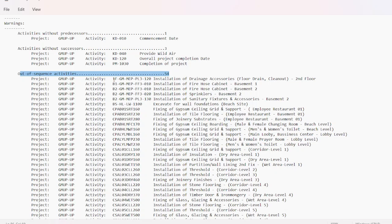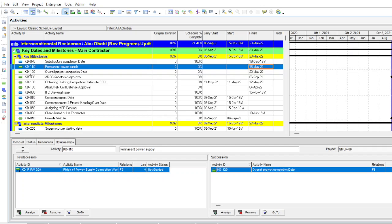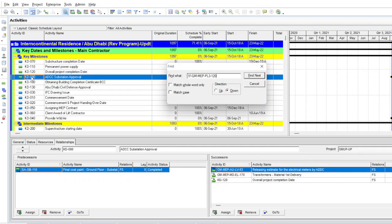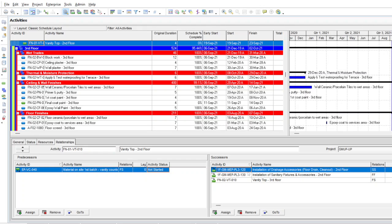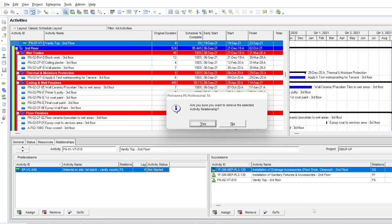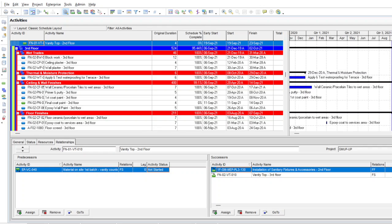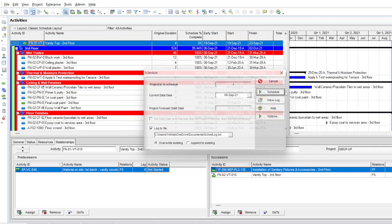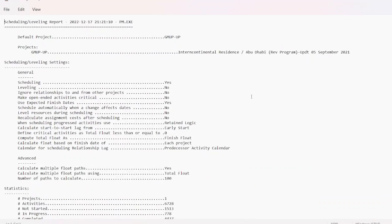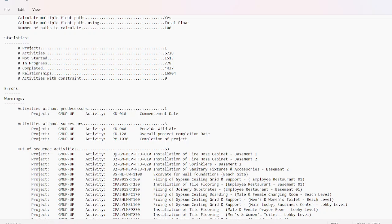I recommend doing these remaining 54 manually one by one, because if you delete these relationships blindly some activities may end up with no successor — which creates another error. You need to check each one, assign a proper new successor if needed, and remove the old one. Select the first activity from the log, copy it, press Ctrl+F, paste and find it. You can see this activity is completed and its successor has not even started. Remove that relationship — it already has two other successors so it won't cause issues. Press Schedule again; the count drops from 54 to 53.